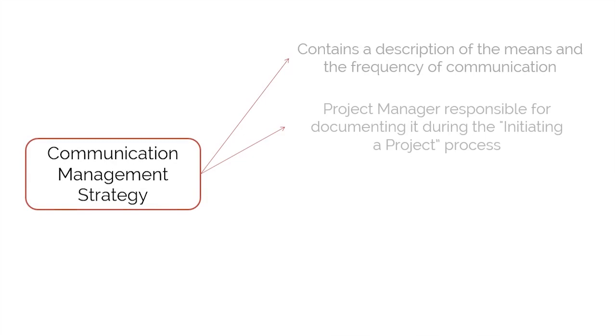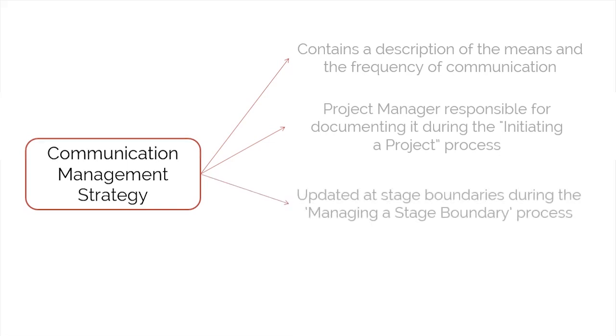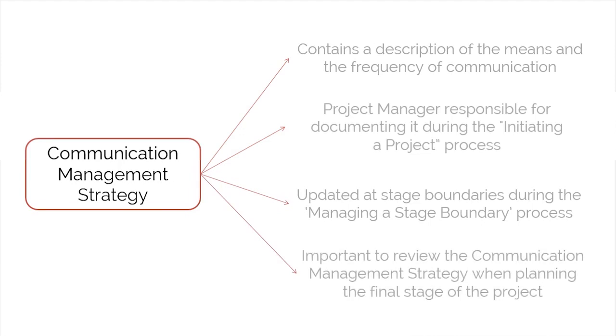The project manager is responsible for documenting the communication management strategy during the initiating a project stage. This is also updated at stage boundaries during the managing a stage boundary process. When planning the final stage of the project, it's important to review the communication management strategy to ensure that it includes all the parties who need to be advised on the closure of the project.